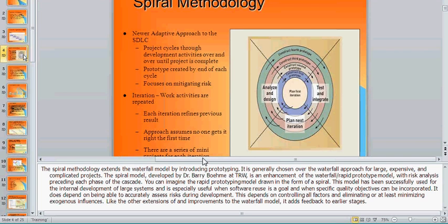Because let's say instead of doing one big project, using up $100, now I've said I'm going to do 2 sub-projects. I've split the money up 50-50. Now the $50 that I have for sub-project 1 is split over the 4 phases. And if I'm in phase 2, or even phase 3 of the first project, I've only used up a part of that $50. Yes or no?